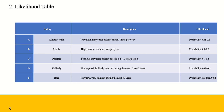Likelihood is rated in terms of annual occurrence on a five-point descriptive scale, showing the likelihood of a specific risk arising and leading to the assessed level of consequences. As you can see here, we have five distinguished levels of likelihood, from 'almost certain' to 'rare,' along with corresponding probabilities and descriptions.